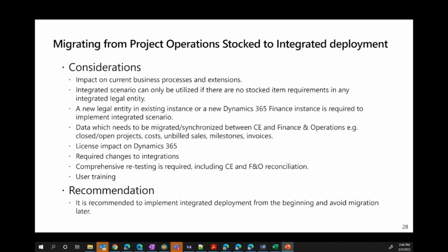In other words, to manage complexity, we often decide in an implementation project to leave behind detailed transaction history because it's technically possible to do, but very complex, and it is not really worth it. So you'll usually bring in open transactions and balances and things like that. Maybe a few historical transactions here and there.